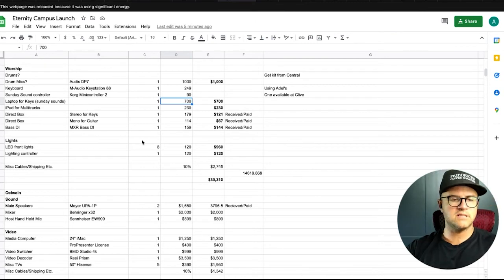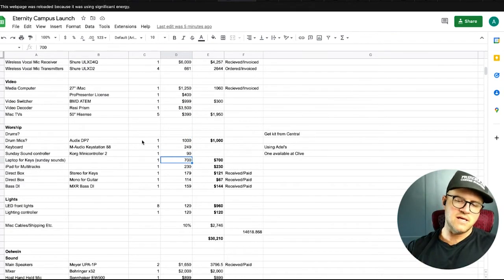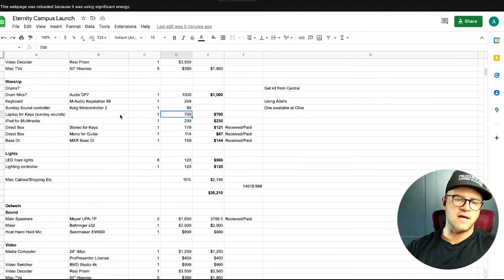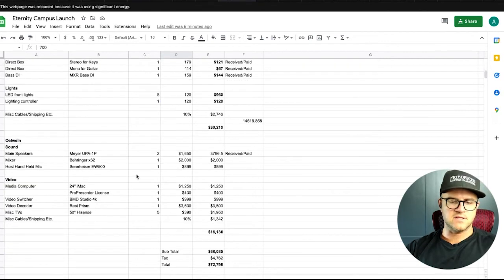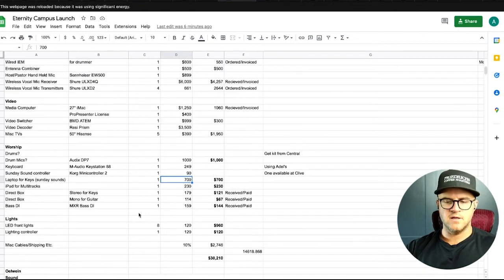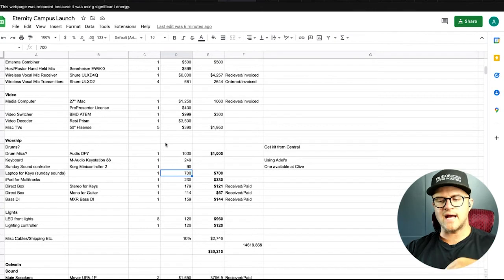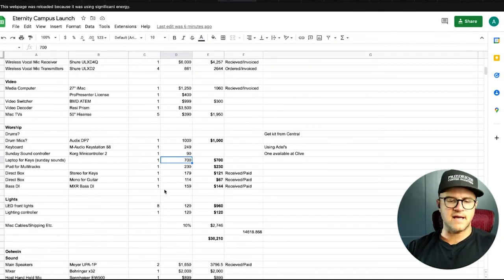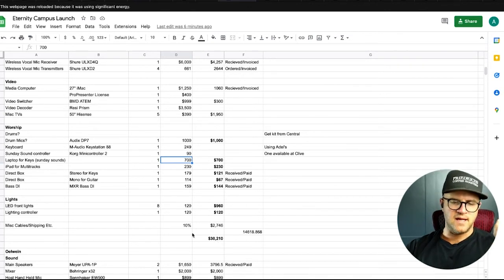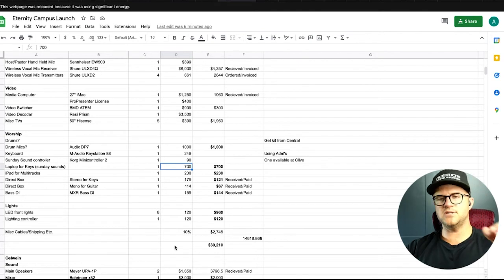So I'm gonna go through this. I'm gonna go, okay, we need this, this, this, and this. I'm gonna add up all the best possible gear that I can and see what it adds up to. I think this total was in the neighborhood of 35,000 when I put all the things I thought would be necessary in, and then I knew it was time to whittle that down. And obviously, guys, I'm right at 30,000 right now, but I do think I'm gonna end up maybe $1,000 or $2,000 under, and that's with a 10% contingency on top of it.